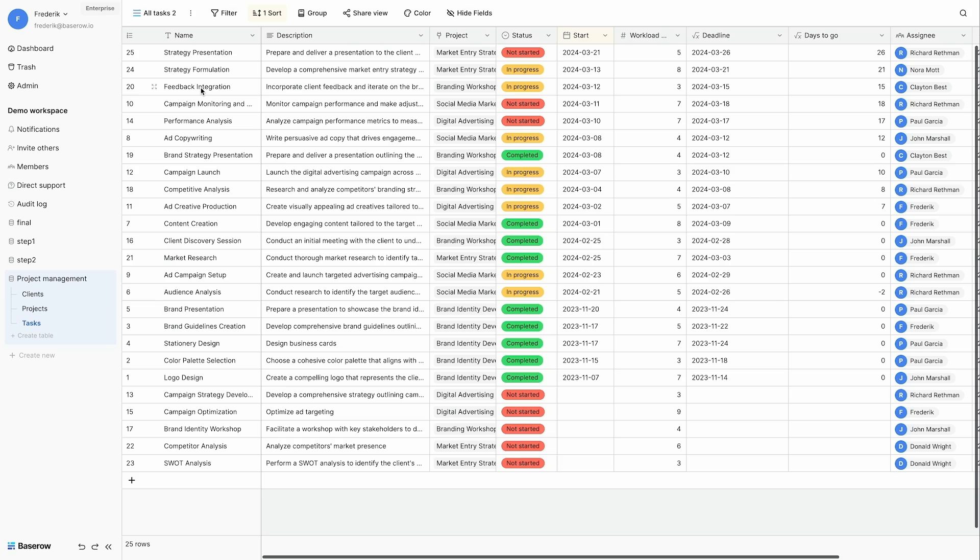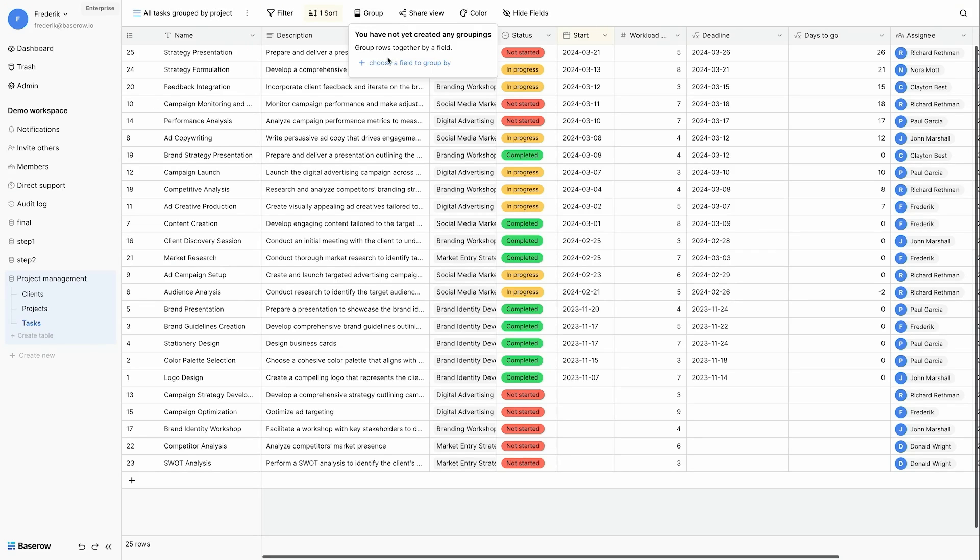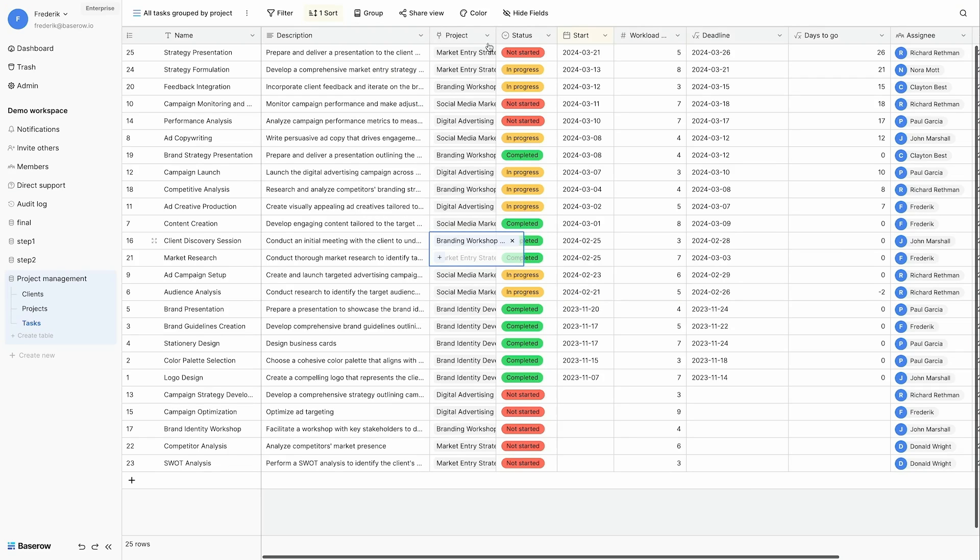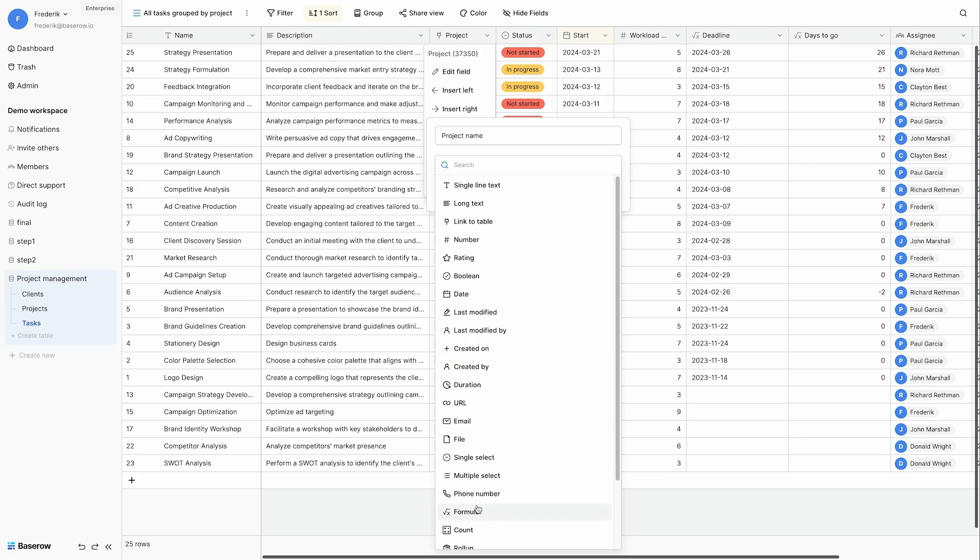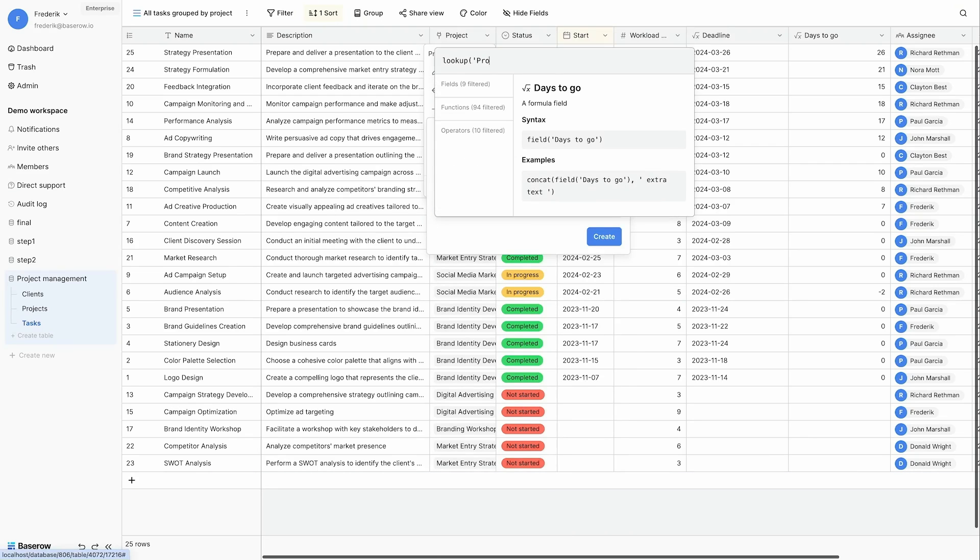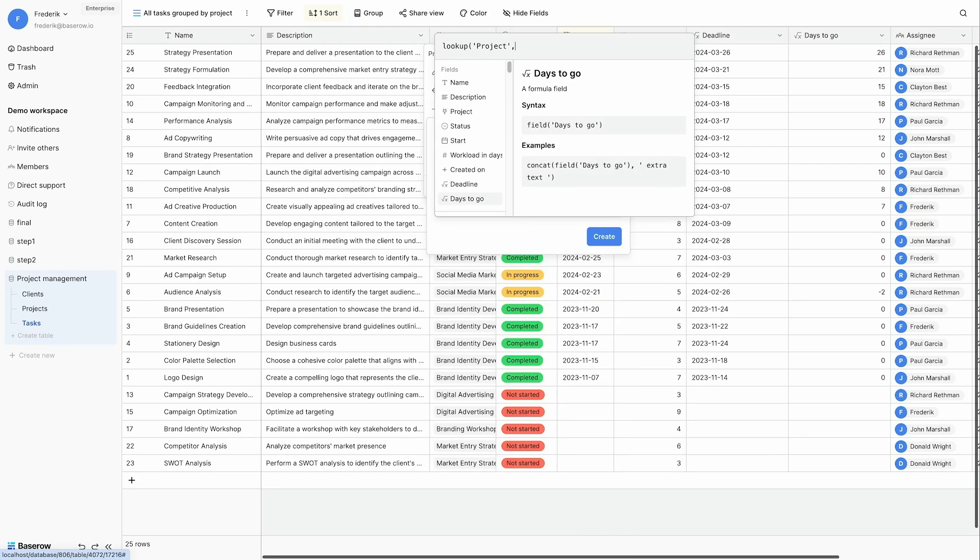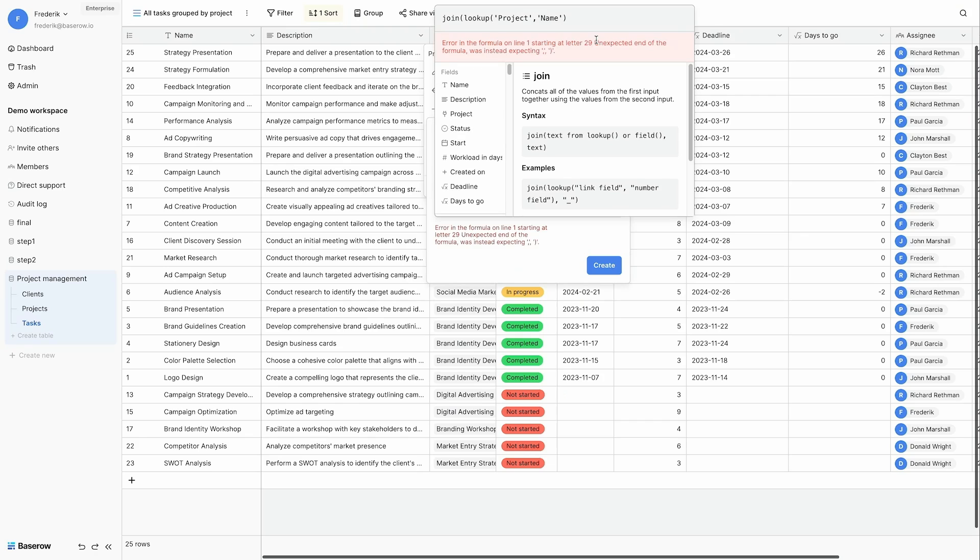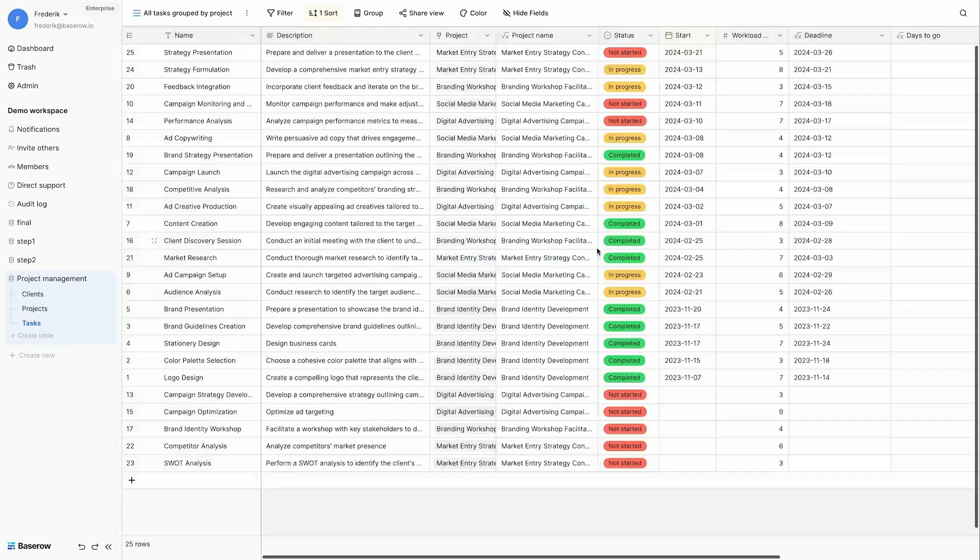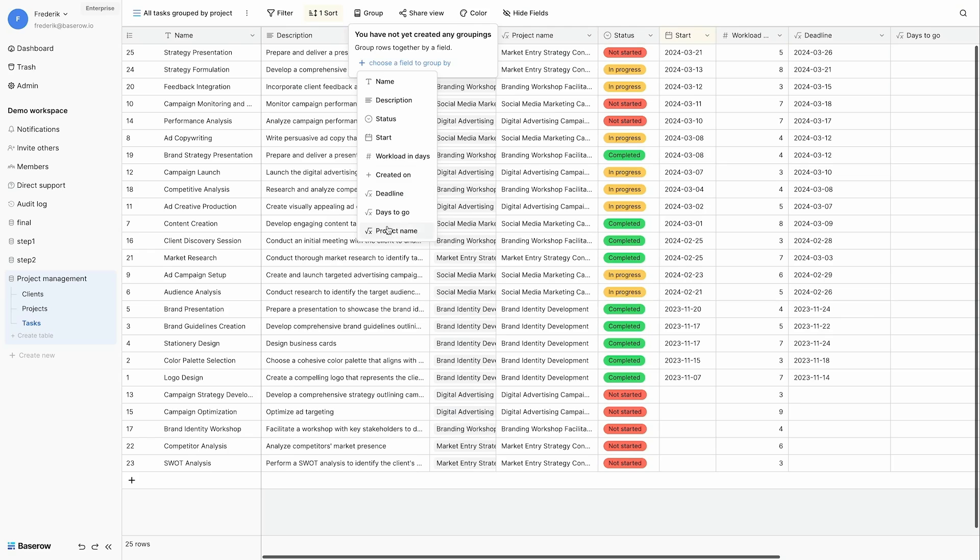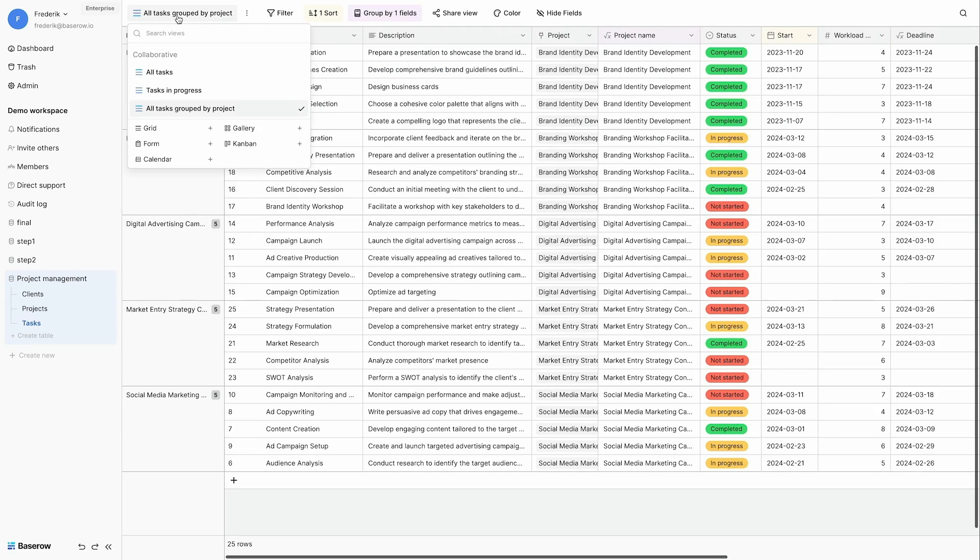I'm going to duplicate this view and rename it for tasks that are grouped by their project. I'm going to group by, but I cannot use the project field. And this is because project is a linked field. So I create a new field for the project name. This will be a formula. I will look up the name for the project. And I will use the join function to convert a potential list of projects into a single text. And this single text field can be used in a group by. So I can select my project name. And all my tasks are now grouped by project.